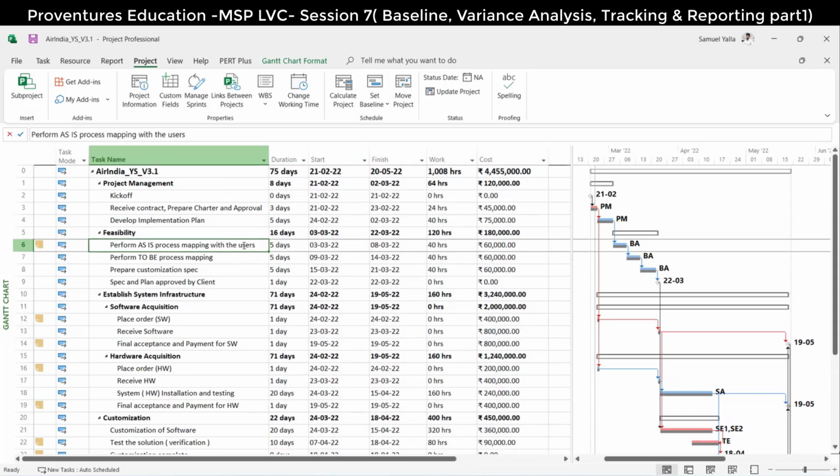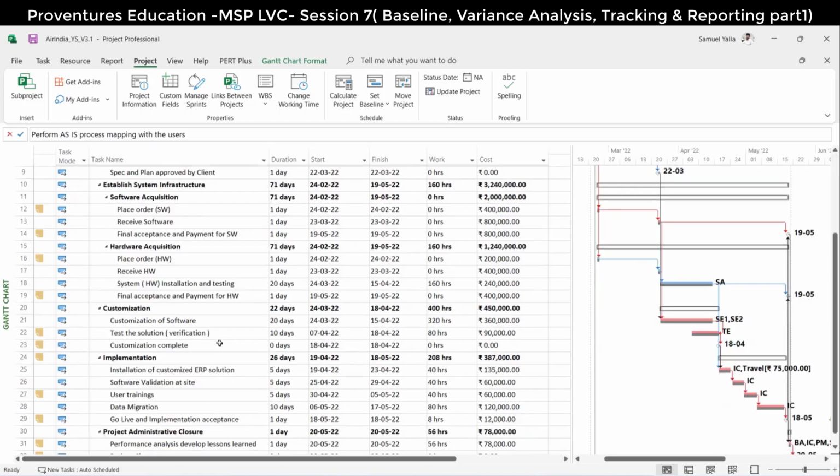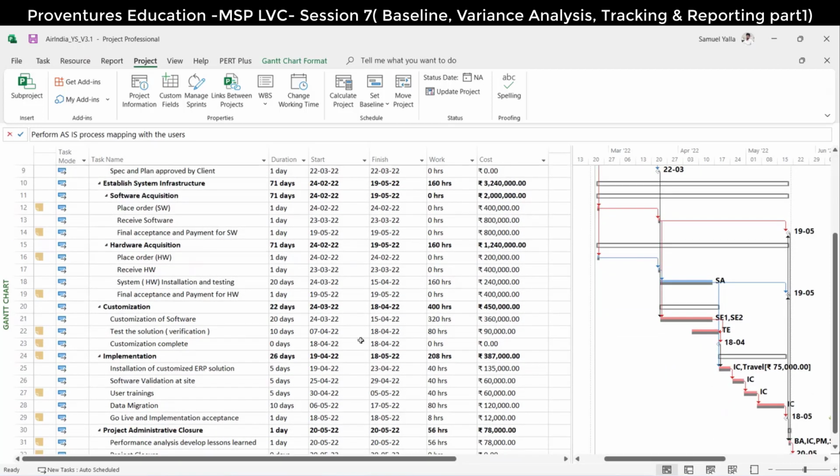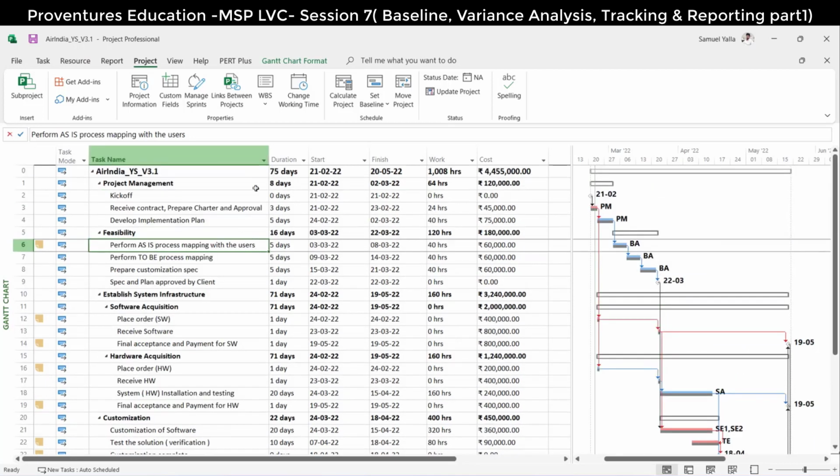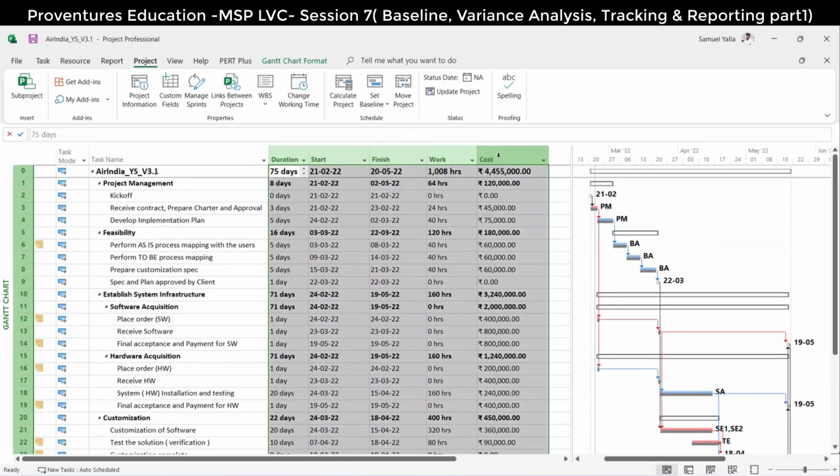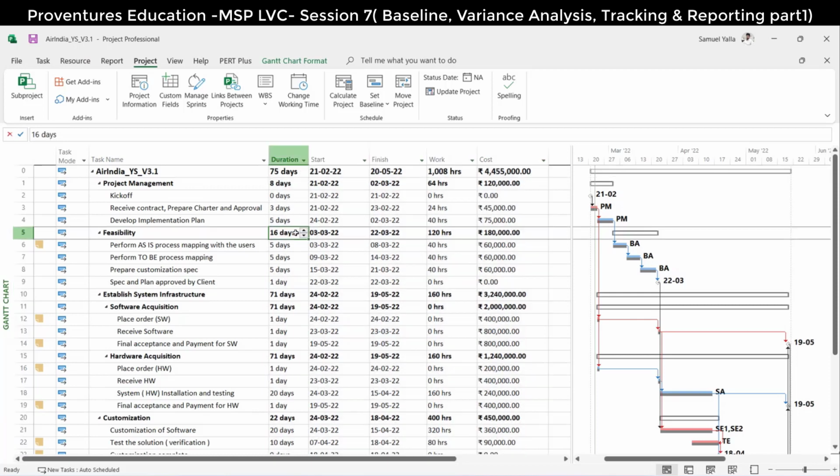If the scope is changed by the customer, then we can go and create a task, update again, and give the estimates and all according to the latest scope. Till then, these are frozen and it is there in the baseline. We should not touch these fields because we will only update the actuals columns. Those actuals will come back and update the plan automatically. You don't need to worry about it.